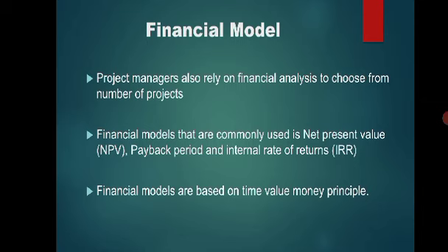However, when you calculate your net present value for different project portfolios and more than one has a positive net present value, or NPV, you pick the project with the higher NPV. Please take note, you pick the project with the higher NPV when both are positive. When one project is negative and one project is positive, you select the project with positive NPV.